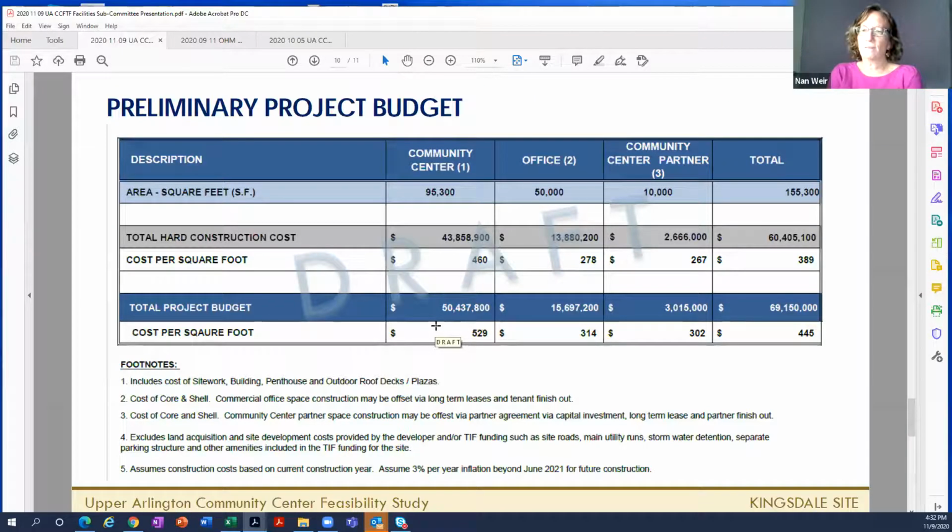And in the next couple weeks, we are also having one of the contractors do a detailed cost estimate. This again was just a high altitude look at this based on anticipated square foot costs and some of the same systems we were looking at, but they are actually going to do a more detailed estimate. So we should have that for our next pass at cost, just to be sure we're really on track. So we're going to vet this one more time at the next level of detail. But so far, we think we're on track.